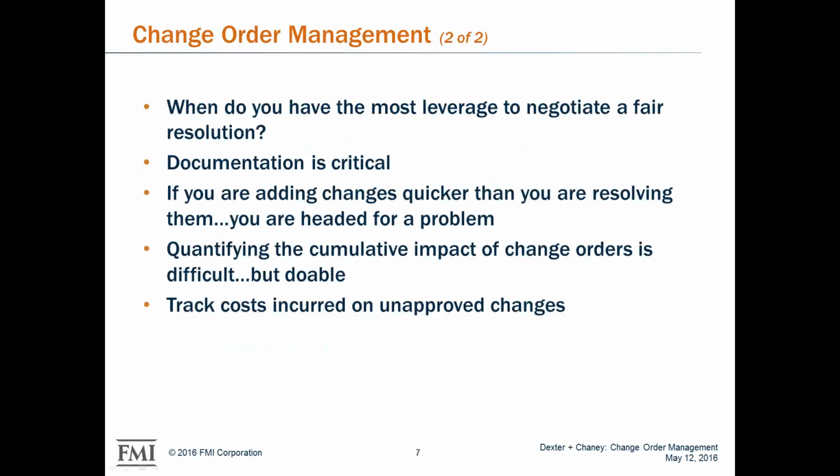And then in terms of when do you have the most leverage to negotiate a fair resolution? I can tell you when it's not. It's not after you've started doing the work or completed the work. Your most leverage is before you ever do it. Documentation is critical. And adding changes quicker than you're resolving them, that's going to be an issue.